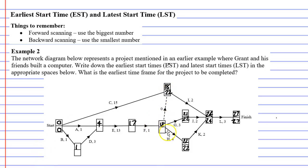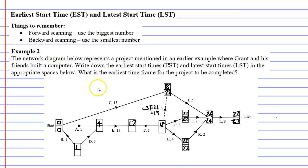This vertex has three different edges connecting to it. 22 minus 0 is 22 — one option. Another option is 22 minus 3, which gives us 19. The third option, 22 minus 4, gives us 18 as our latest start time. So we have three options, but for backward scanning we use the smallest number, so we use the latest start time of 18.